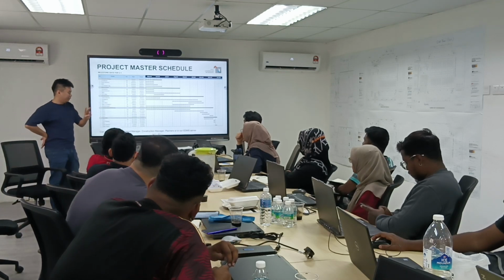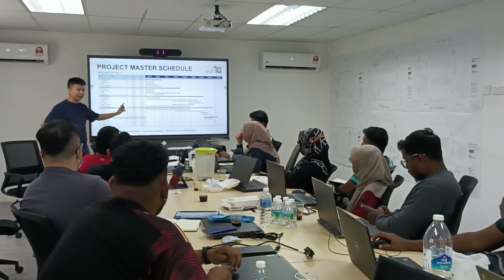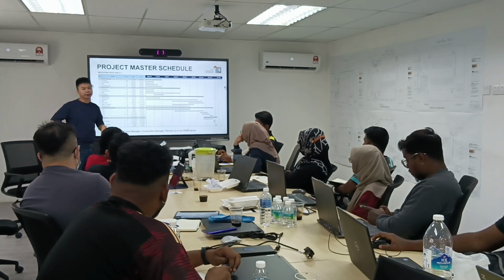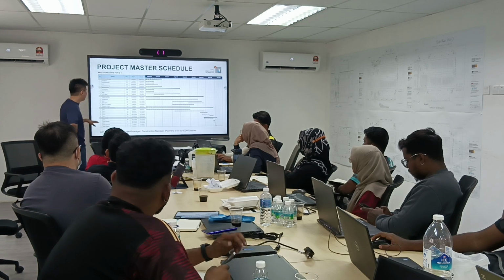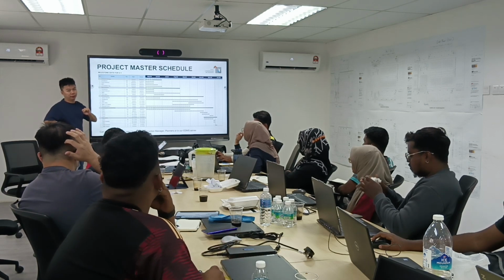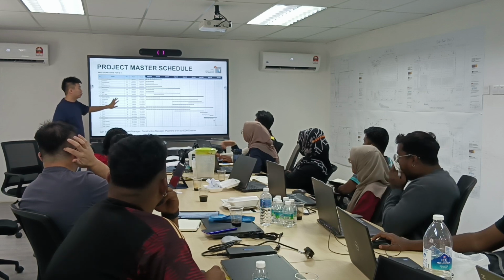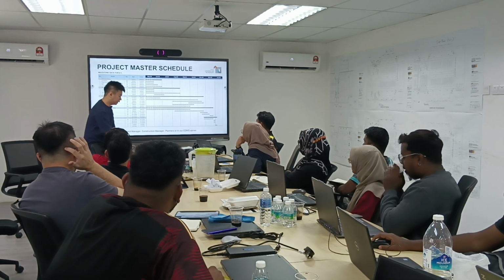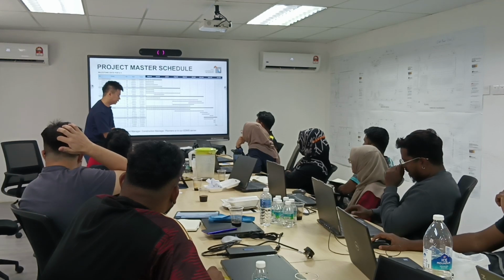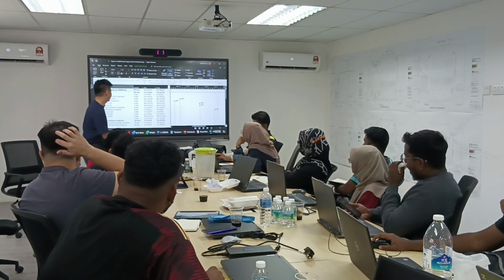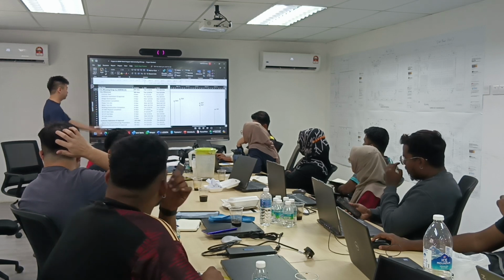From your project manager, your construction manager, or EDMS. So the master schedule is always in the EDMS. This information is good enough for high-level planning and reporting, but it's not good enough for your day-to-day activity. If you want to do day-to-day activity planning, I suggest you get a copy from the planner team, Isato, Yana, or Adam.